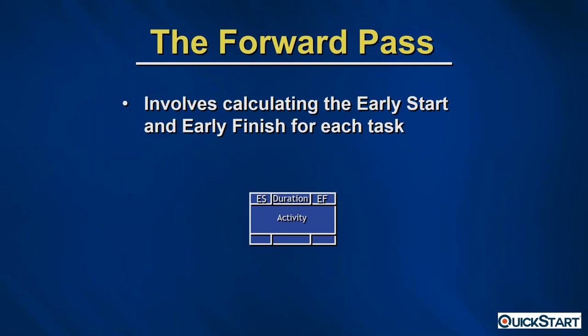With that in place, let's do a forward pass. In the critical path method, the forward pass involves calculating the early start and early finish dates for each task. The activity name goes in the center box, the duration in the upper middle quadrant, the early start on the upper left, and the early finish on the upper right quadrant.